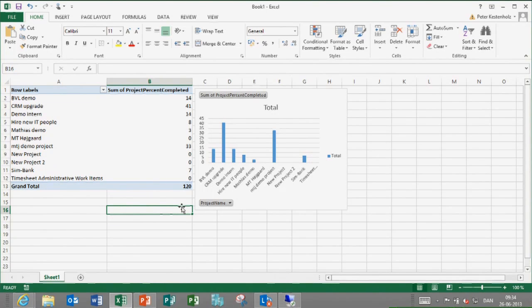And again, just to make it even more understandable, maybe the data connection files is where you would do the permissions. So this data connection that controls these 8 custom fields related to project can be accessed by the PMs. So the data connection and the refresh functionality in the data connection will then have this group of people accessing it. So it's on the data connection layer as well, you can control it.